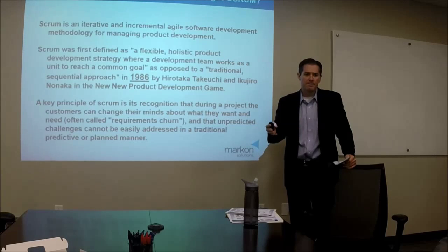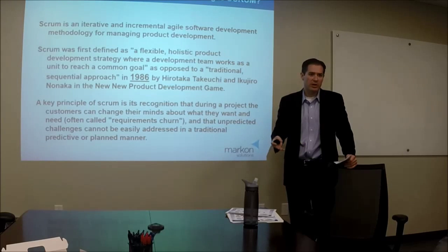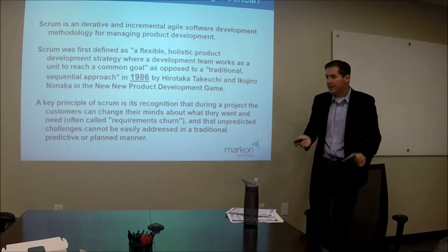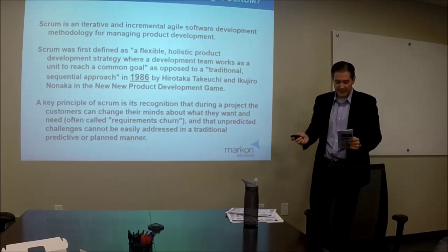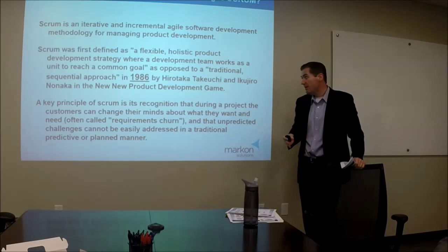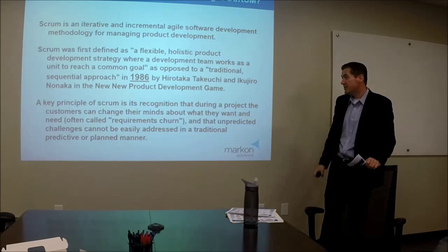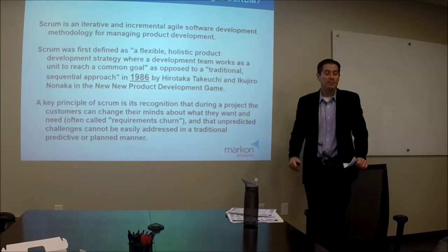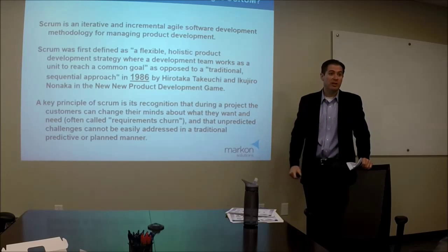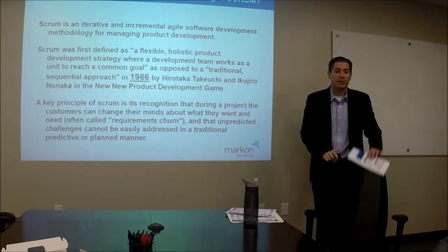The other thing I would say is where Agile doesn't work well is when there are high fixed costs. If there are not high fixed costs, and not high rework costs, on the type of work you're doing, then Agile works really great. This isn't a new concept. 1986. This has been around for a long time. Two Japanese guys wrote a book in 1986 called The New Product Development Game. So while most of the time you're using it for software development, it's also for regular product development.